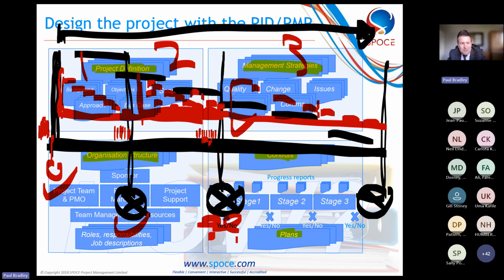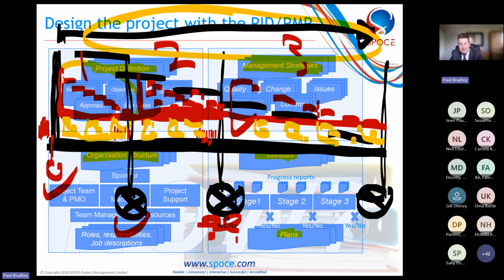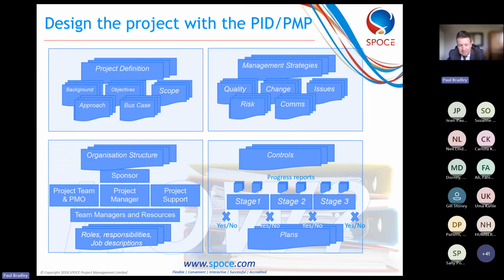So we've got the project level plan and the stage level plan. What else have we got? Well, within these, you may well have a whole load of smaller plans, which are team plans, more detail. They relate to the work packages that we're doing. So suddenly we've got 3 levels of plan: the project plan, stage plans, and team plans. And that's how we can control the project. Plan it in the right level of detail so that everybody knows what's going on.